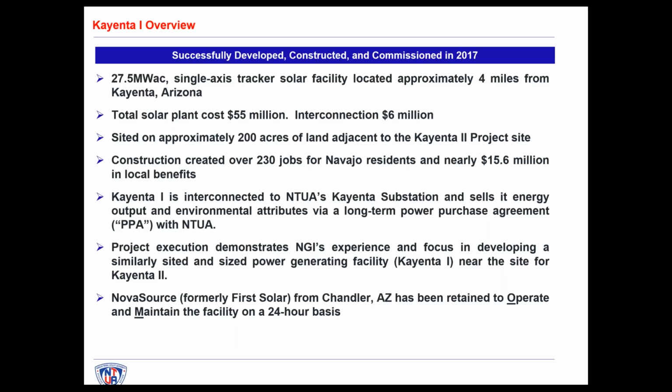Kayenta 1 is interconnected to NTUA's Kayenta Substation, which is more or less adjacent. It's about 1,000 feet away from the Kayenta 1 site. It sells its energy output and environmental attributes via a long-term power purchase agreement, or PPA, with NTUA. So NGI sells to NTUA, and then NTUA has a PPA with SRP, Salt River Project, to sell both the RECs, the environmental attributes, along with a shaped energy output to SRP.